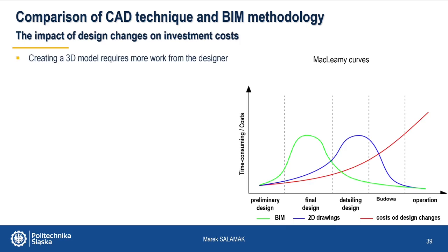The differences in CAD and BIM approach are best seen in these charts showing the so-called MacLeamy curves. You can see the impact of the changes in the design on the final cost of the investment in comparison with the involvement of the designers.